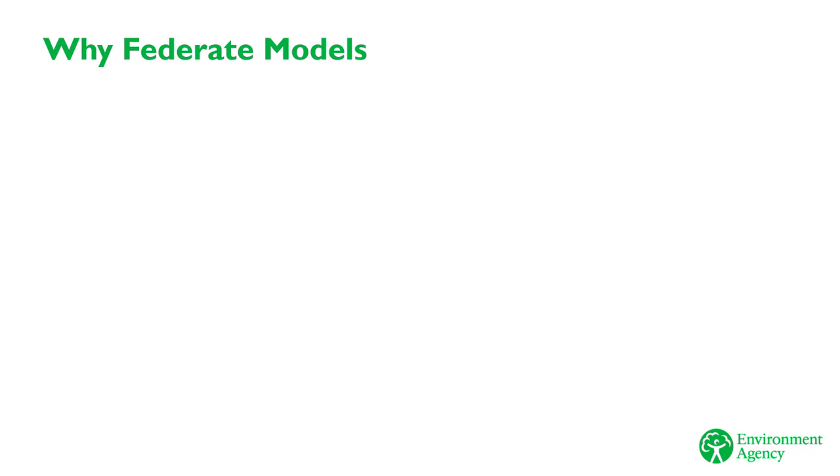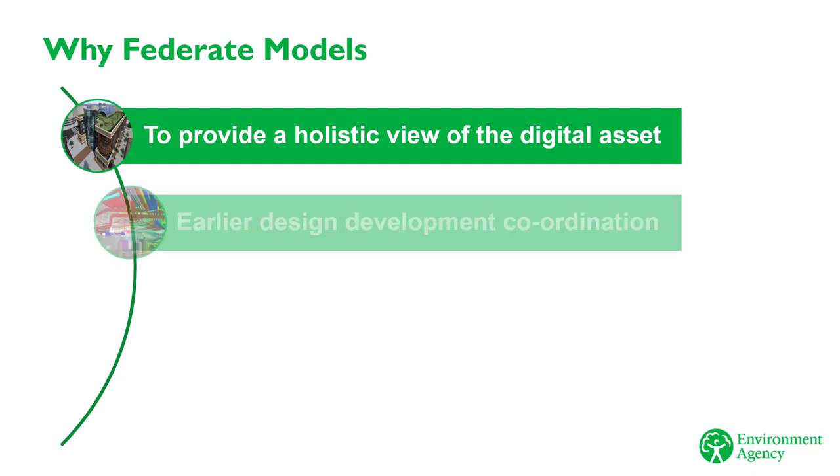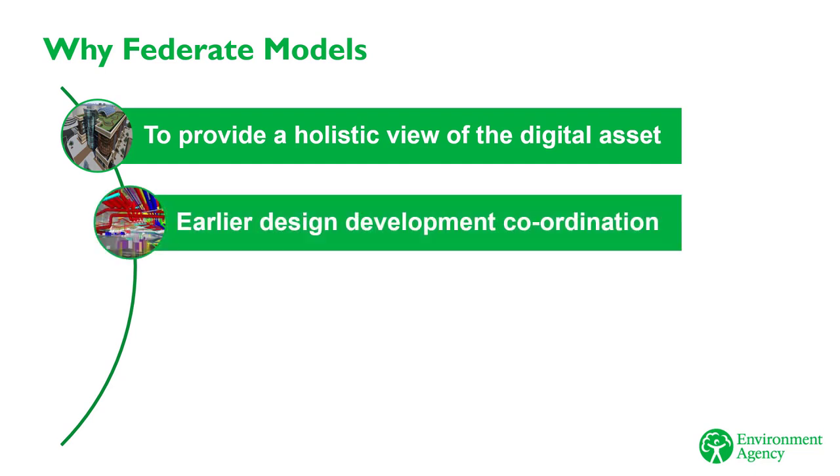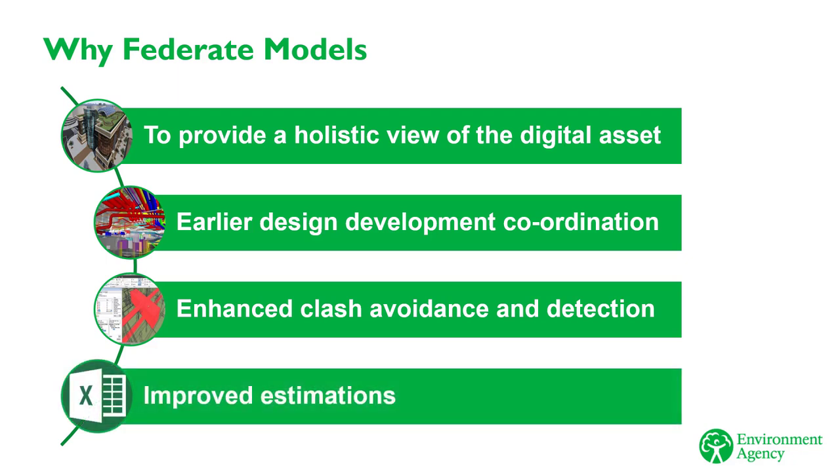The purpose of federating models is to provide a holistic view of the digital asset or facility. It aids design coordination by allowing identification and resolution of issues in advance of site work and therefore avoids costly changes during construction. It enables clash avoidance and detection through regular consolidation of models from multiple suppliers and designers earlier in the project. With more data provided and consolidation upfront, as well as specifications confirmed and shared, it becomes easier to estimate timings and costings.